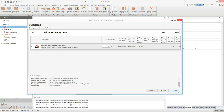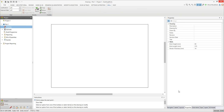Depending on the specifications you've selected, you may then be prompted to add concrete pump hire to your estimate. Type the number of days hire required into the rate quantity box and then click finish. You're now ready to begin drawing your walls.